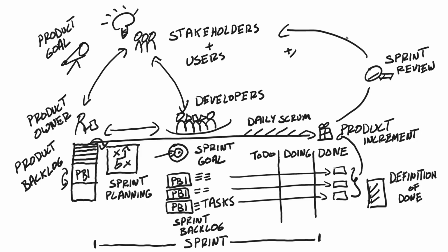Next, the team has a sprint retrospective to inspect how they are working as a team and see if they can improve. The sprint review is about inspecting and adapting the product, while the sprint retrospective is about inspecting and adapting the process of building the product. Any action items that come out of the sprint retrospective get added to the next sprint backlog as tasks for the team to work on.